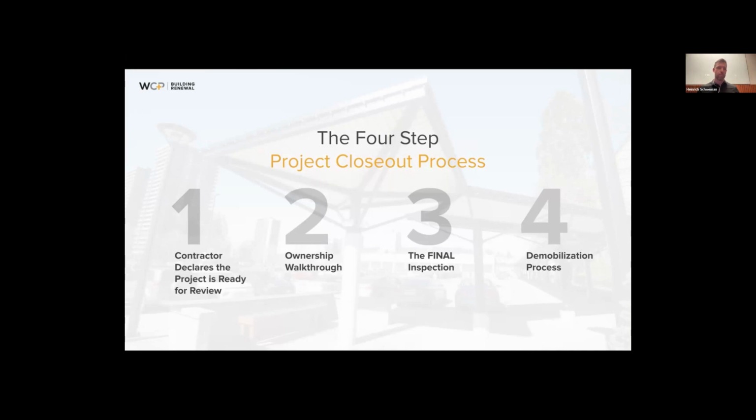So demobilization, more specifically in plain language, just means all the items, the equipment on site is being removed. So boom lifts, scaffolding, toilets, any other fenced off areas, tools inside a common area, for example, that need to be addressed. All of that gets demobilized and importantly, cleaned up, pictures are taken, high fives are had, everybody's happy, and the project gets finalized, right?